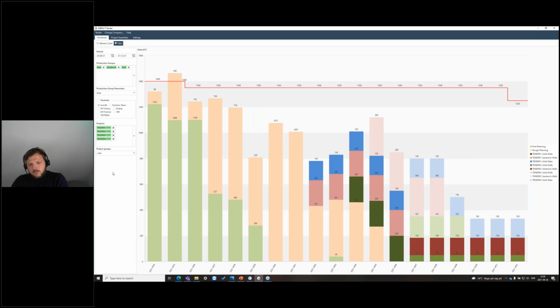this is not to see your capacity in the next 2 or 3 weeks, because you kind of know. That's why you have the fine and the rough plant. It's not to see the next month, it's to see the next 6 or 7 months. So if you have an ongoing project that is going to take a big fair chunk of your capacity, then you kind of know it is there, because there is always going to be rough and fine plant elements ongoing. So of course you have to change that project to production and realize that this is a realized project now, so I'm expecting more rough and fine plant in the future.